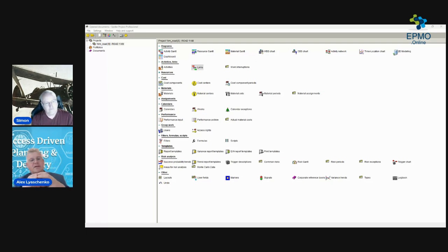And then we have a big library of these templates, and there is a specific way you manage this library. Every time you run projects and they don't proceed as you planned, you analyze why it happens, and you may need to go back and update the template. Or maybe the process has changed, so we have new equipment, new technology, and we can get the same result a different way. So you're not just updating your schedule, you maintain this knowledge center.